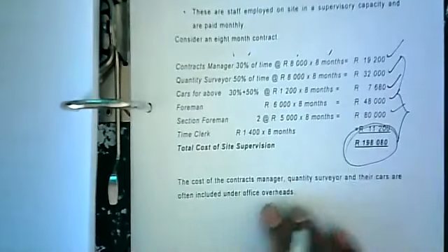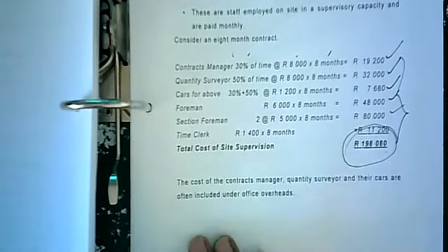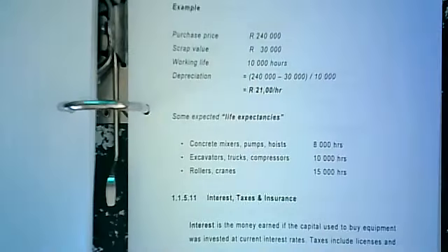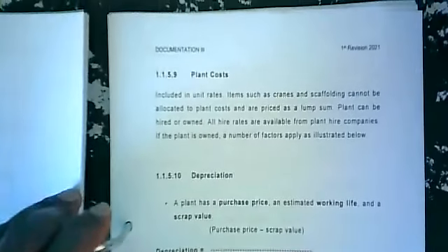Right, the cost of the contract manager, quantity surveyor, and the cars are often included under office overheads. All right, let's look at plant costs.